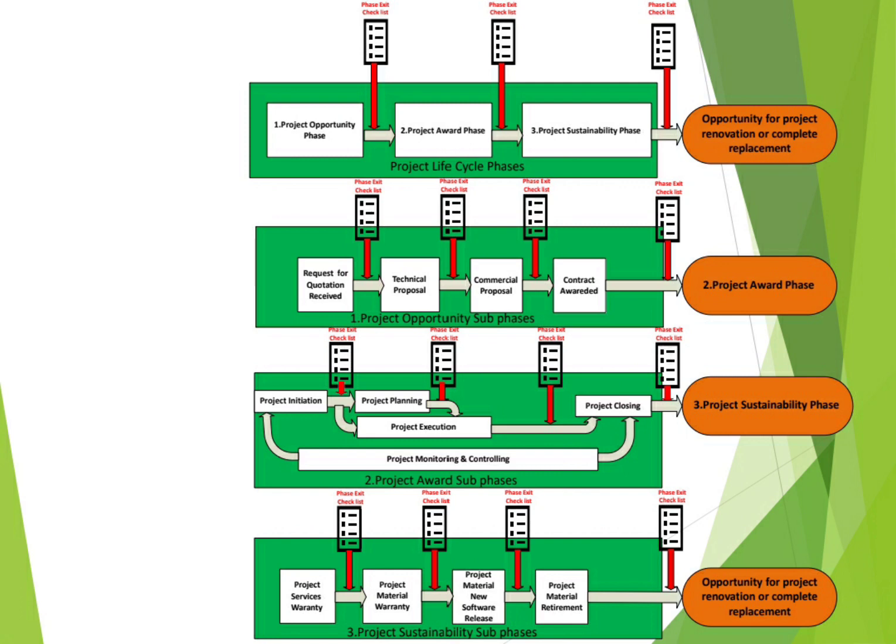Maybe also the technical team from your customer will have comments about some activities that are missed, or activities which are not needed. All of this will also be discussed, and another round internally to be done to revise this baseline time schedule. And after that, the project baseline time schedule should be submitted officially to your customer.